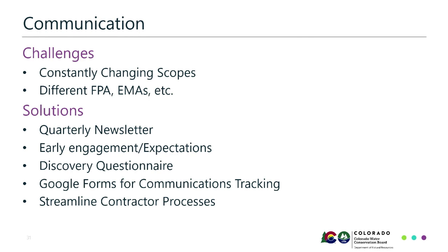We've been able to develop some ways to help minimize disruption and help local officials stay in the loop through early engagement and set better expectations so that local community officials know they are vested in this process. And they also have a role to play in the success of the projects. Some of our strategies are listed here, and we have found that thus far local community participation rates have increased, and we have been able to obtain some useful information very early on in a project with a questionnaire at the discovery point that can provide us with more specific needs for each community.